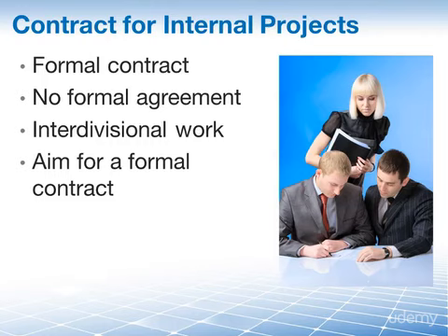Please remember that this is where your experience may vary from what you are expected to know for the PMP exam. Every company has different procedures, but in a perfect world, and the PMP exam assumes a perfect world, you will have a formal contract between the buyer and the seller, even if they are two internal departments.